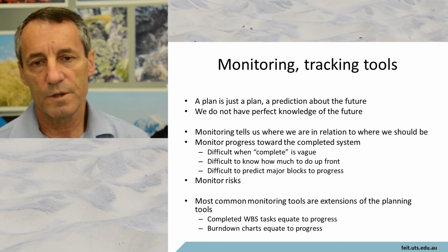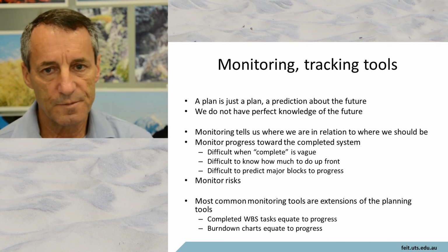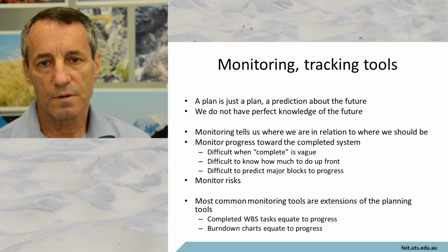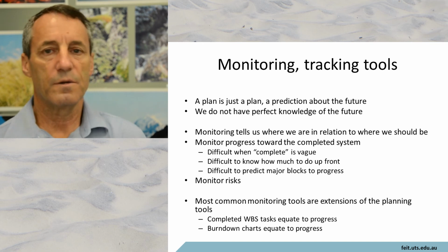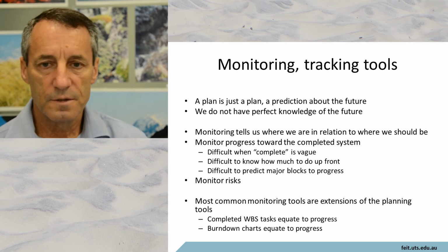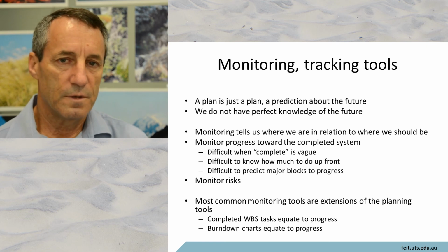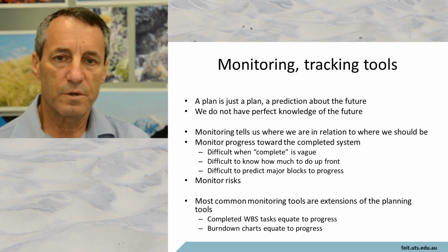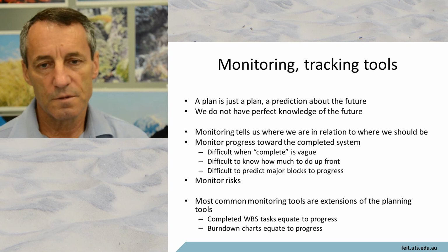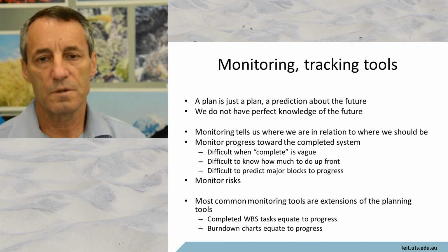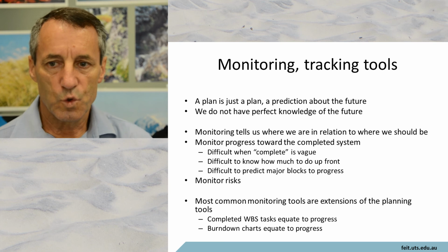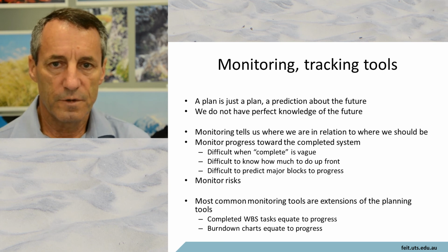Now, most of the project planning tools, the Microsoft Projects and Primaveras and those kinds of things, tend to give a fairly standard look at things, and they will tell you how far through you are compared to what you expected to be, and that's great. The ones from the ticket-based systems tend to give you a burn-down chart where you expect your progress to be a certain amount, and you can see how much work you've done in the time, and you can see the work being completed in time, and you get your estimations from there. So those kinds of monitoring tools work quite well and are very, very helpful.